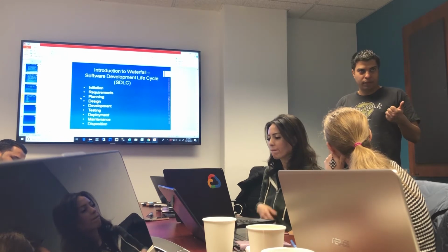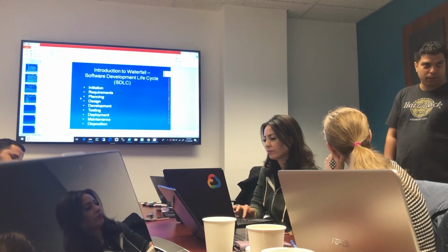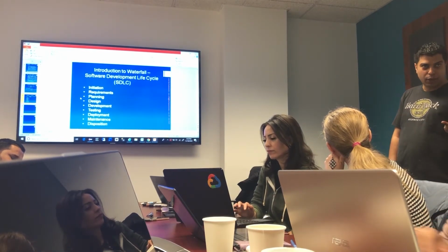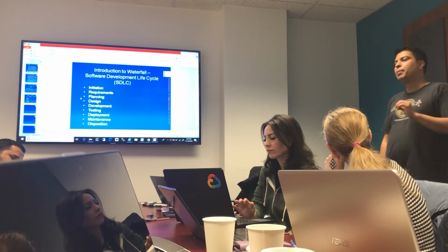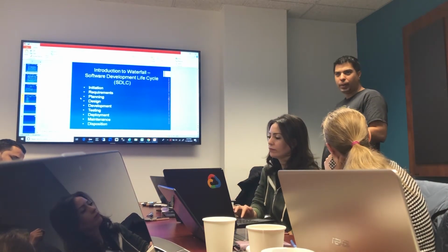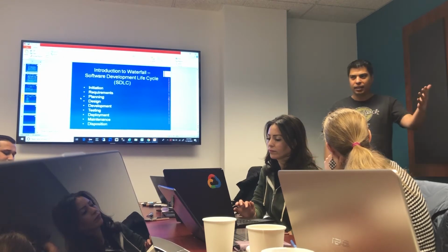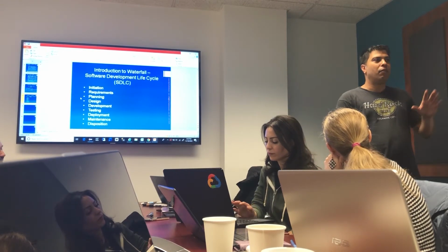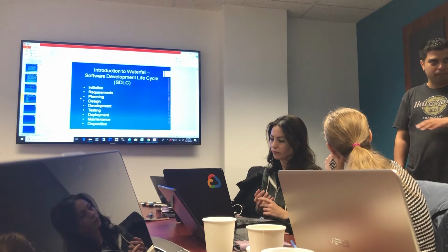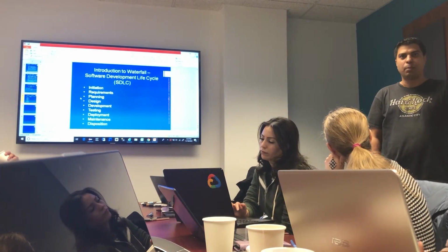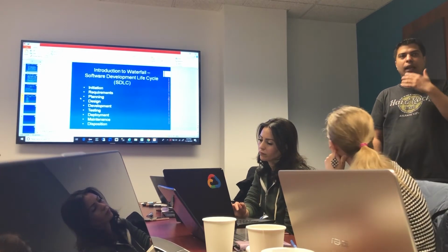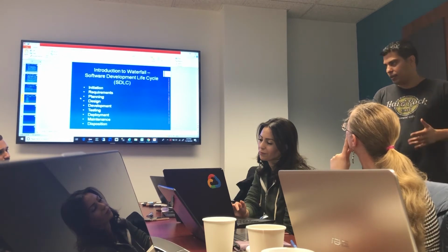BRD is signed off, the UI mockups are signed off, the FRD has to be signed off. So sign off does not really mean that you sign anywhere on a document. It is just an email agreement that we have reviewed it. My team, we as in each manager has to say, my team has reviewed it. We are very clear and we agree with it.